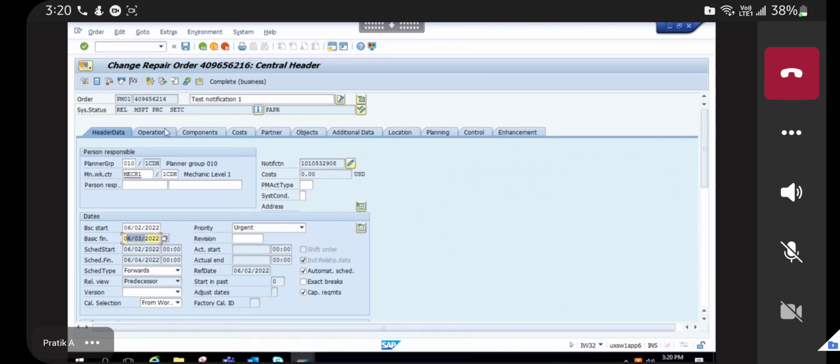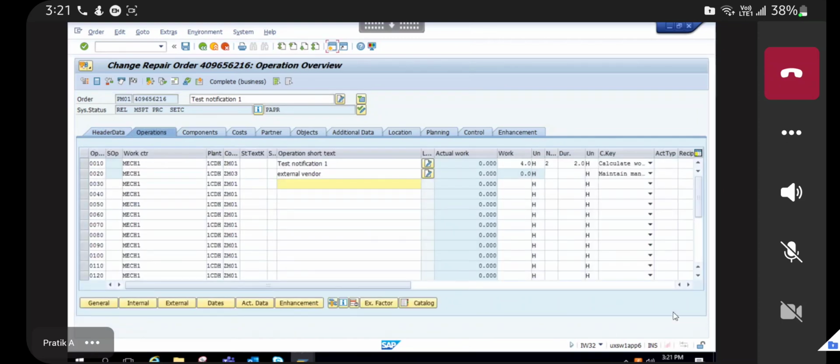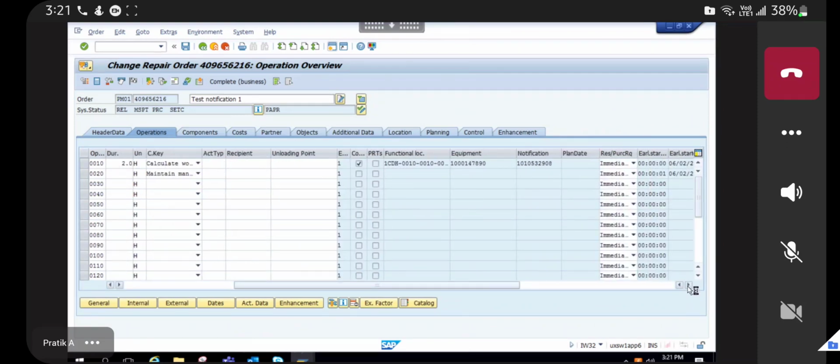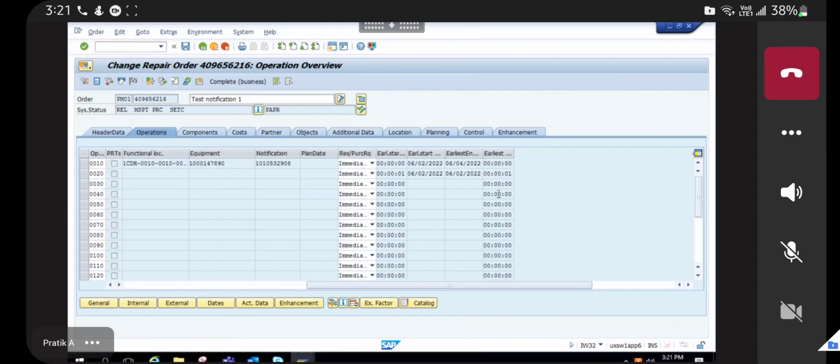But because we have added that must start and must end, that's why it's scheduled like this. Ideally, if we have multiple operations and we want to finish two operations at the same time, the start and end dates of each operation will be calculated accordingly, and it will be assigned here.